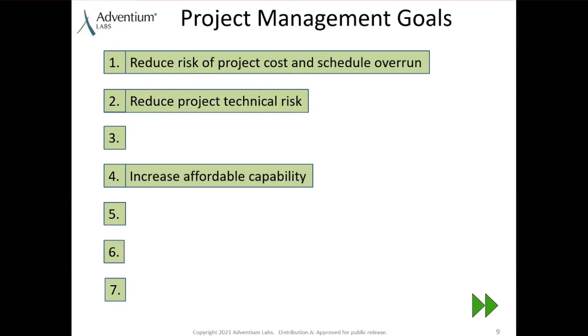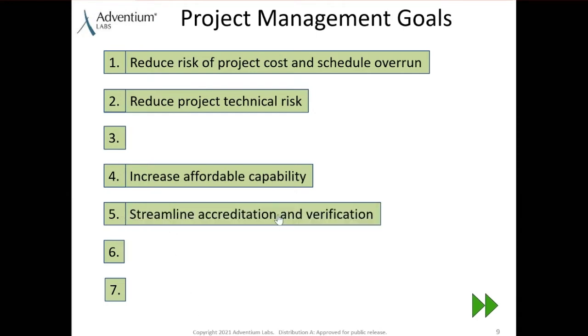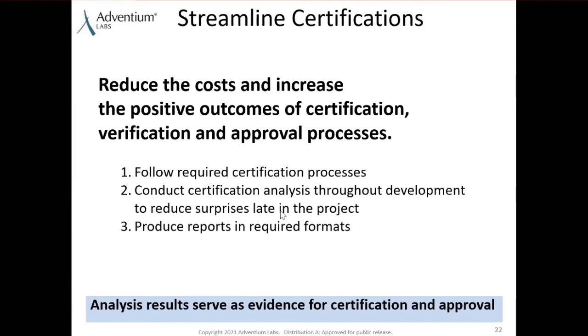Yes. All right. I noticed no one talked about verification or certification. That is definitely one that often comes up. So let's talk about verification and certification. We can reduce the costs and increase the positive outcomes of these certification and verification processes using an ACVIP process, and it helps us in a couple of ways. One is we can define this process in terms of the analysis and verification that we need to do along the way. And what's really nice about virtual integration is that we can conduct this verification throughout the development process. This really reduces surprises late in the project. So as we develop our system, we can continuously be looking at the kinds of analysis that we need to support these verification and certification processes.